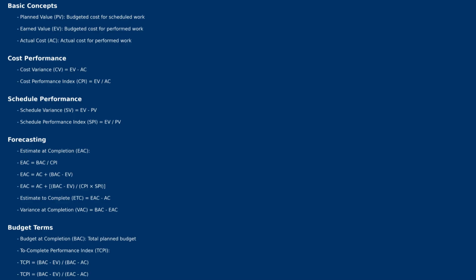CPI shows 0.90. What does this mean? We are getting about 90 cents out of every dollar we put into the project. Schedule variance is showing a negative of $400. What does it mean? We are behind schedule. SPI shows 0.93. What does it mean? We are only progressing at about 93% of the rate planned.